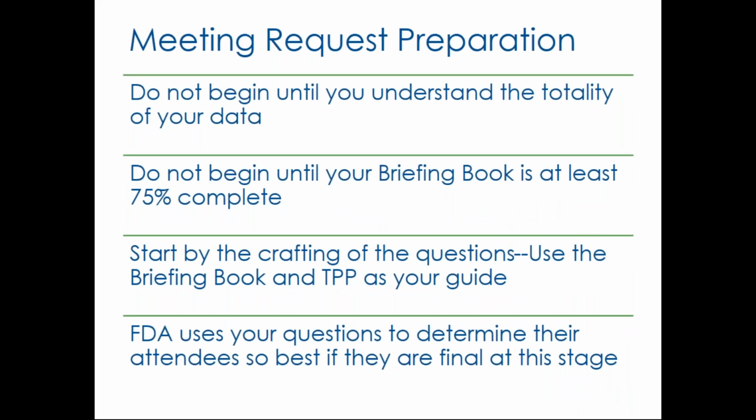So I hope you notice I haven't said one word yet about the meeting request. The meeting request really shouldn't be developed until you have a full understanding of your data and you have a very mature briefing book. You've already started crafting your questions as part of guiding your briefing book preparation and assessing the key issues that you need to discuss with FDA. So once you have an idea of when you will have a final briefing package ready to submit to FDA, you're in a position to begin preparing your meeting request hand in hand with finalizing your briefing package.